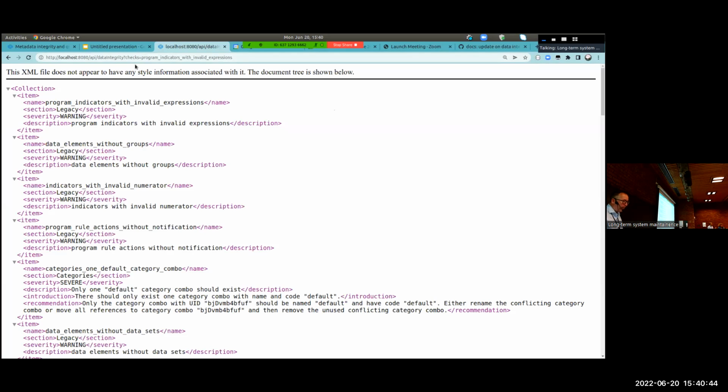Nora and I came in and we were just horrified because the desks were covered with these huge registers and stuff. And we said, you cannot implement this. And Nora then spent 14 days. They basically bought into that. She spent 14 days negotiating with all the health programs and cut down the number of data items they wanted to collect from 13,000 to just over 1,000. And that tells you if they had gone the route of trying to collect 13,000, they would have had an even worse mess.